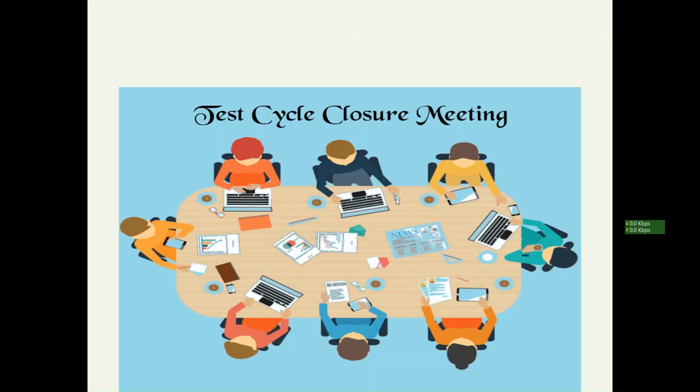Next, we hold a closure meeting with all the stakeholders and discuss whether, as per the requirements, we completed everything and whether we are good to go for release. We started this project with a kickoff meeting, and in the same way we close it with a closure meeting. There is something called test closure and project closure. Test closure is done at the end of every release. Project closure is done at the end of the project.